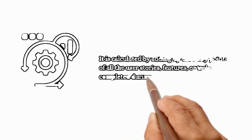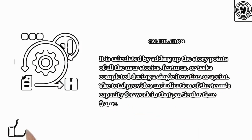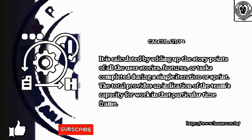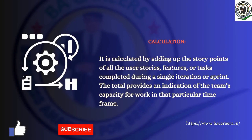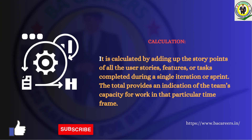Calculation: Velocity is calculated by adding up the story points of all the user stories, features, or tasks completed during a single iteration or sprint. The total provides an indication of the team's capacity for work in that particular time frame.